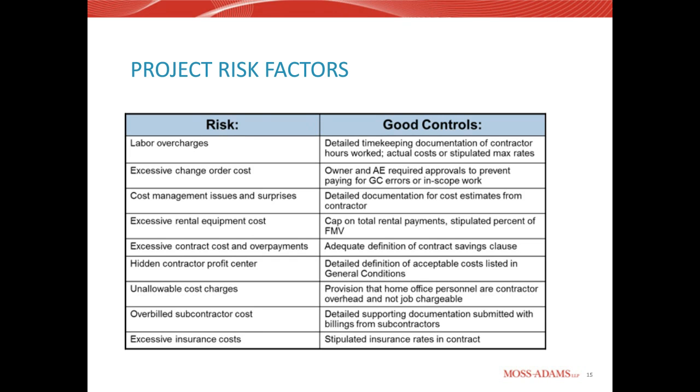Very often we see a subcontractor include its original bid margin on the change order, which is great. They could do that on the original contract. They can put whatever margin they wanted because hopefully there's a competitive bid situation. But when you're reviewing a change order, it's a sole source negotiation at this point, where it's really important to understand what costs are allowed in there, what kind of markups are allowed, what percentages. Are they putting in insurance costs when there's potentially an OCIP or a CCIP on the project, which is an owner-controlled insurance program or contractor-controlled insurance program, where a subcontractor should not be putting any insurance costs in their change order costs. So items like that are a big one.